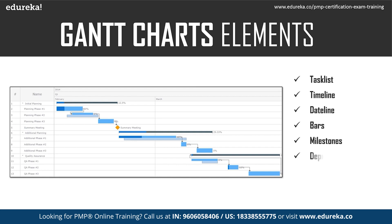Then dependencies. There are relationship establishments between one task and other tasks. Obviously there is a dependency — unless the previous predecessor activity completes, the successor activity cannot start. Dependency types include finish to start, start to finish, finish to finish, and start to start. Such representations help us to understand the dependencies. Also, between phase one and phase two, there is a lead — so the condition to have that lead is also a dependency which can be explained.